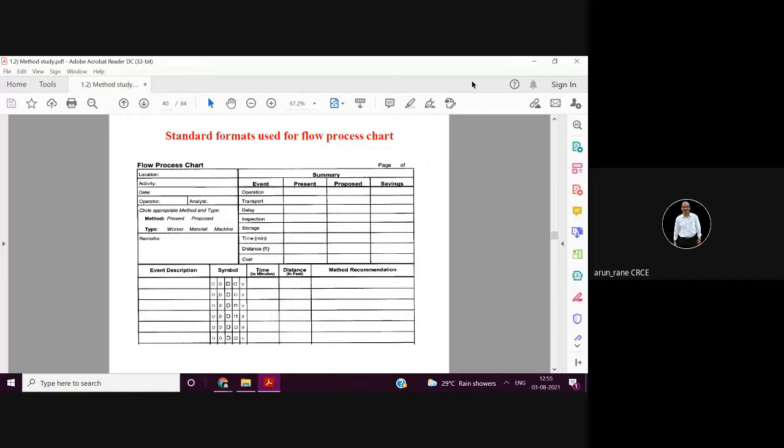In mechanical, you may need a compressor, you need compressed air, you may need cylinders, regulators, a water line, an air line. So these are your pneumatics. In automation you will need some kind of HMI. So all these you have to consider. It will not be just the machine alone. Understand? So as a purchase engineer, you have to see this and do purchase planning.